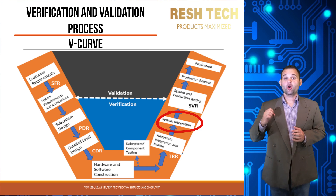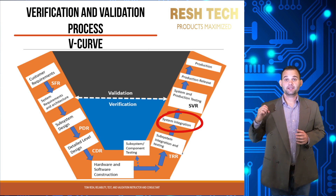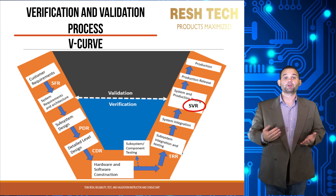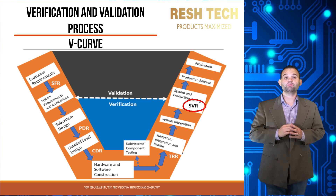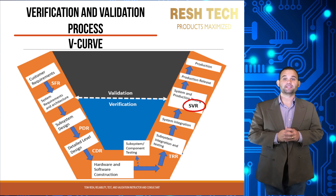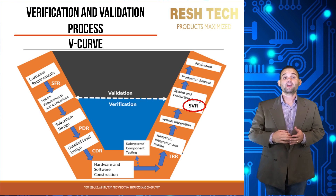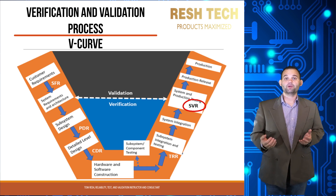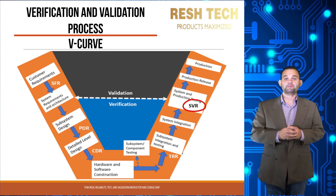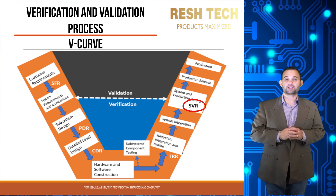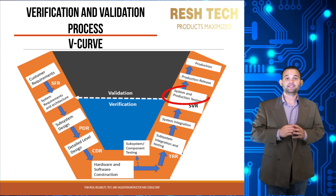After verification activities — including simulation, documentation checks, dimensional checks, and physical testing — a System Verification Review (SVR) is performed. All stakeholders review verification activities to decide whether to move into a preliminary production phase, or to change the design if a risk assessment shows customer requirements won't be met or if there are weaknesses in the design. The SVR is a final sanity check before spending money on hard tooling for mass production, though in some programs it may be conducted before all verification activities are complete and a risk call is made to proceed.